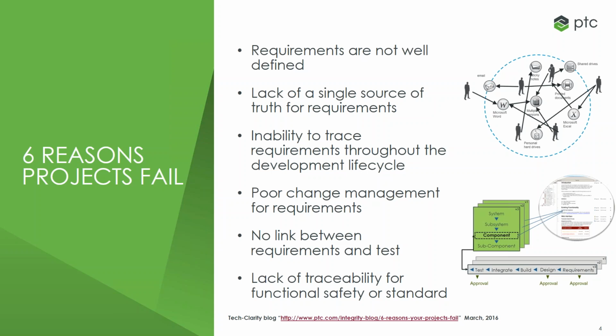So looking at your requirements environment and how poor requirements management can contribute to project failures or project delays: things like not having well-defined requirements, lacking a single source of truth. So you might have lots of requirements documents sitting in Word documents, and they might be shared on wikis or are stuck in places like SharePoint. But making sure that everyone's got the latest up-to-date version of requirements and that everyone's looking at the same thing is obviously very important. Having the ability to trace requirements to other assets in the development lifecycle, so tracing down to source code, tracing to your product assets, tracing to test cases, obviously all very important things.